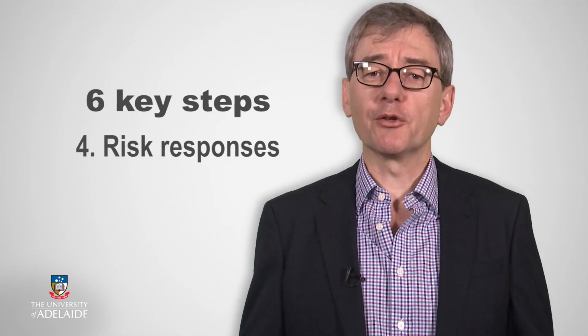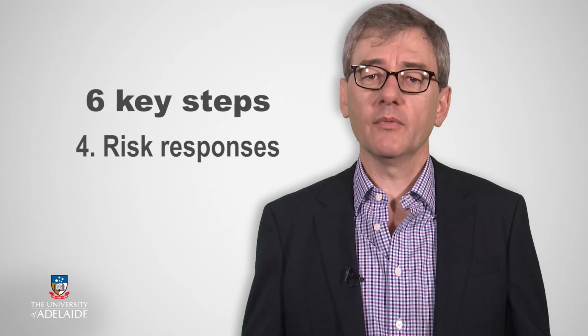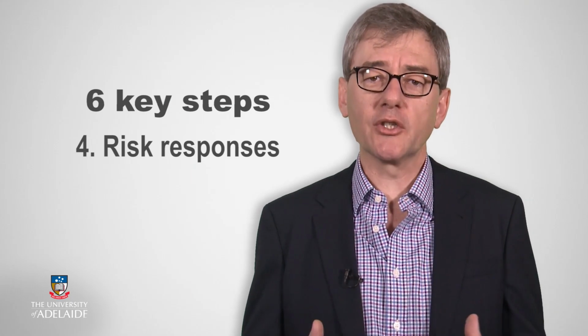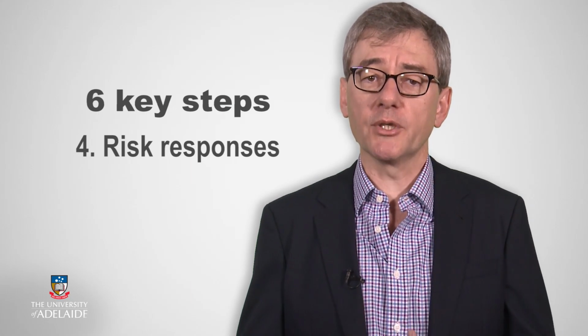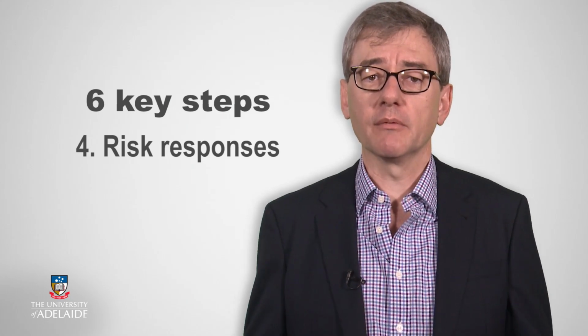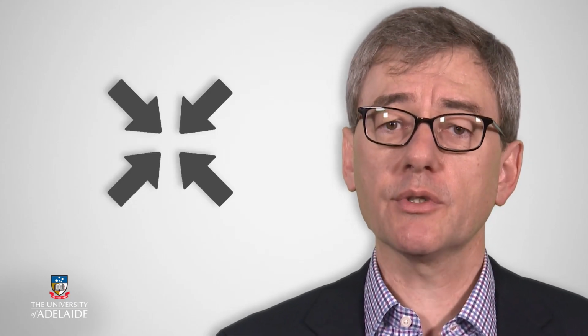The fourth step is to consider and plan risk responses. This is the process where we develop risk response strategies that will aim to address the impact of major risks on the project objectives and your success criteria. Risks can be responded to in 4 ways. Risk can be accepted, risk can be transferred to another party, such as a contractor or client, risk can be mitigated or reduced, or risk can be avoided. Each of the specific risk responses should correspond with the priority and potential impact of the risk.